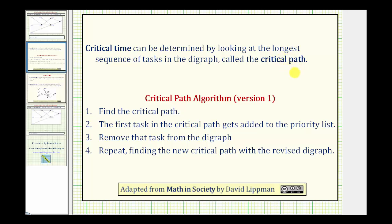To create a priority list using the critical path algorithm, we follow these four steps. Step one, we find the critical path, which is the longest path in the digraph. Step two, the first task in the critical path gets added to the priority list. Step three, remove that task from the digraph. Step four, repeat finding the new critical path with the revised digraph.